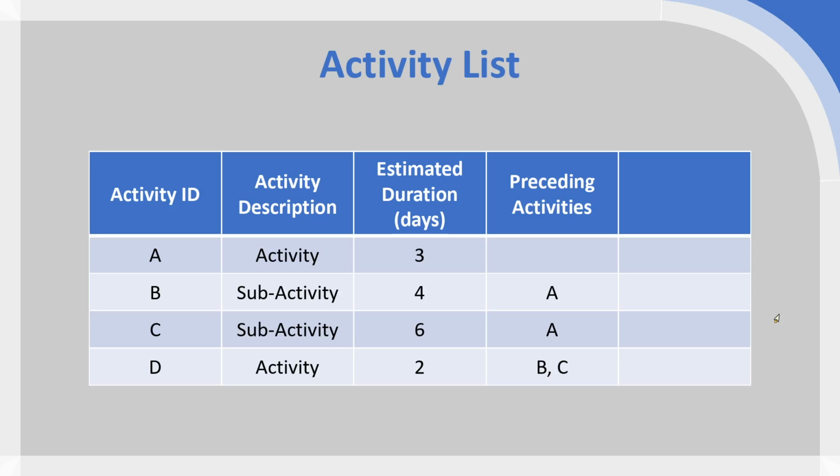This is not an order in which you want to execute the project. Remember, we're not constructing a sequential order. We're not going to have projects, activity A through to whatever activity finishes the project, and set them in a sequential linear order. We're only looking for activities which have to be completed for your activity to start. And this is important because you may well have a project team which is working on multiple activities at the same time. So we're not going to place them into a straightforward order. We're only looking for necessary preceding activities.